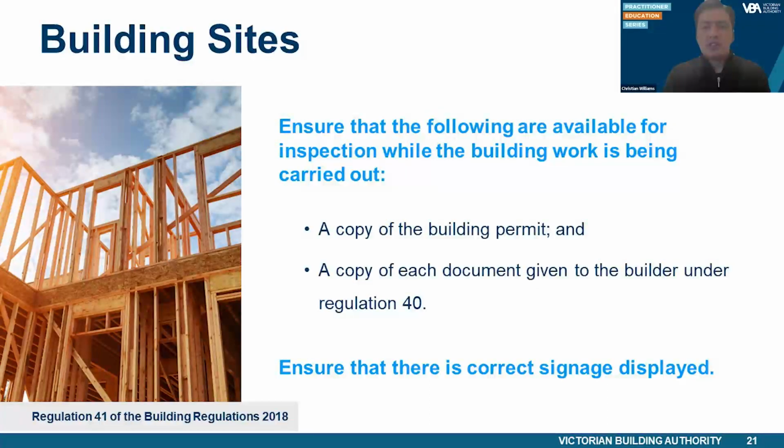Please note that the documents located at the allotment must be in hard copy and not in electronic format. This is to ensure that all persons needing to access the documents on site have the ability to access them. Furthermore, we suggest keeping the documents in a prominent position at the site where it cannot be adversely affected by the weather, but is also easily accessible to persons needing to access the documents.